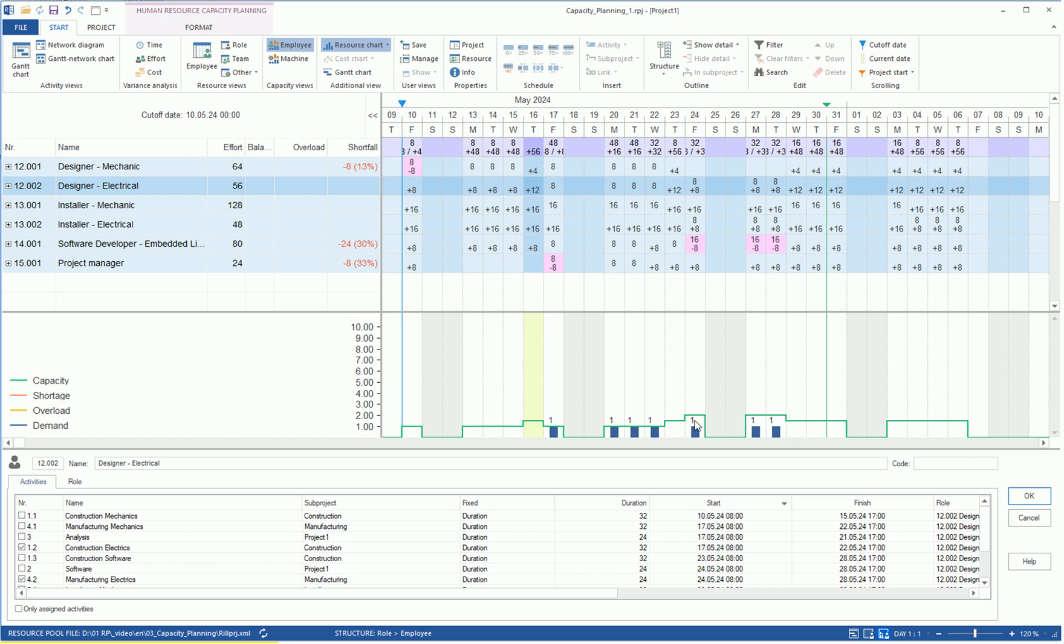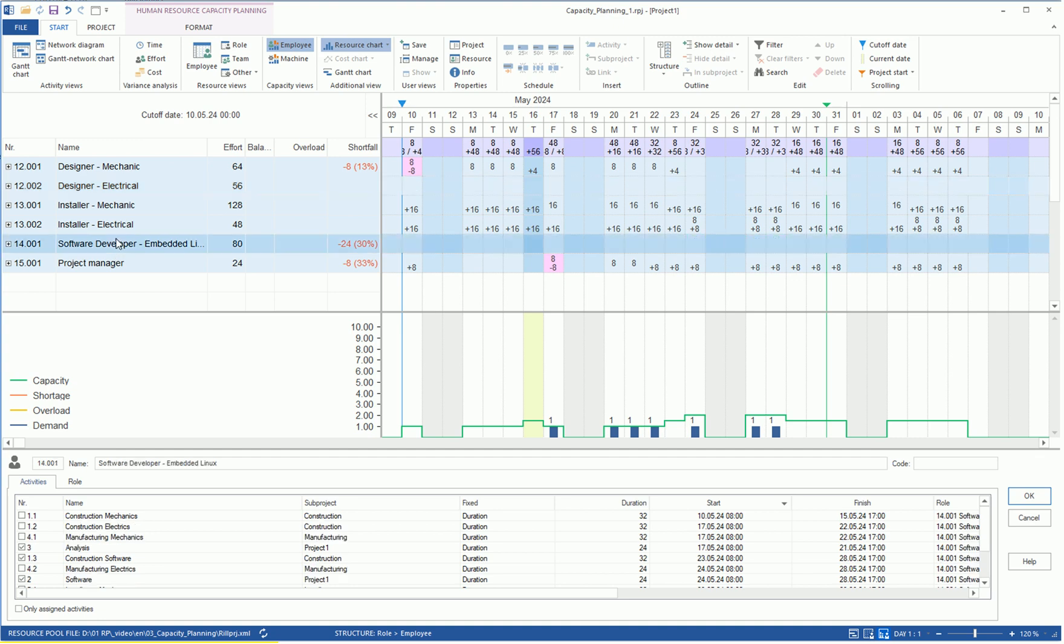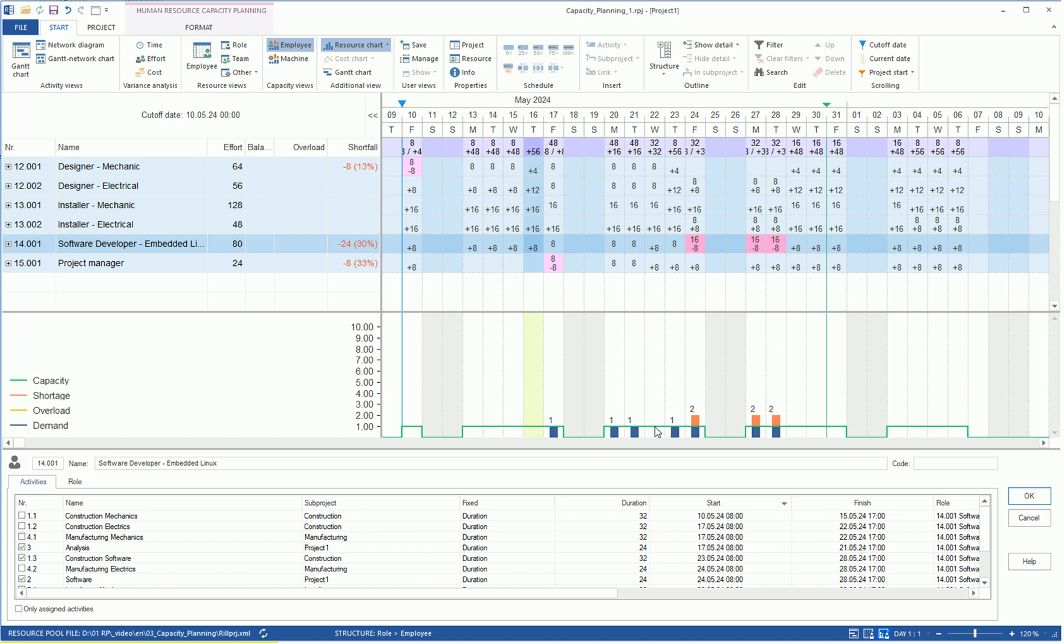If the green line, the supply of employees, is above the blue bar, the demand for employees, there is a personnel over-coverage. We switch to the role of Software Developer. Here, the green line runs through a blue bar, indicating a personnel shortfall, which is displayed as red bars.